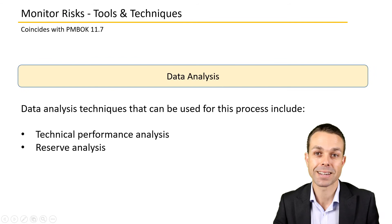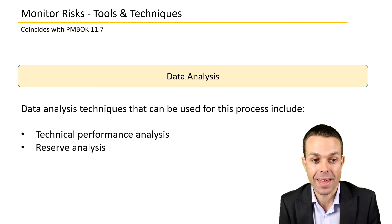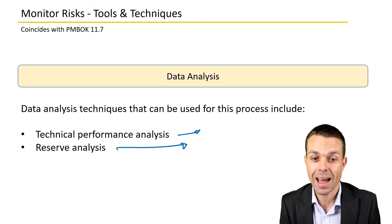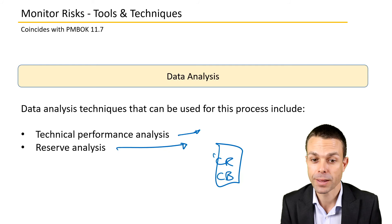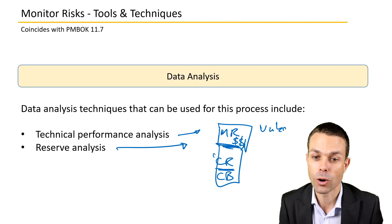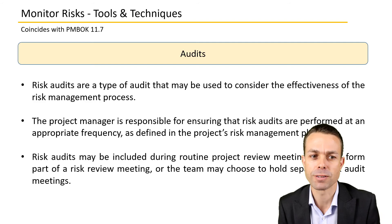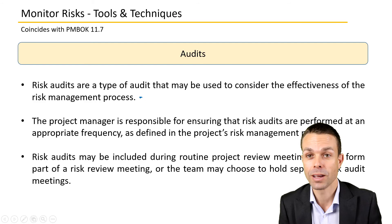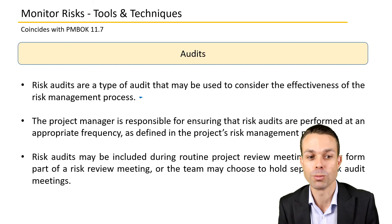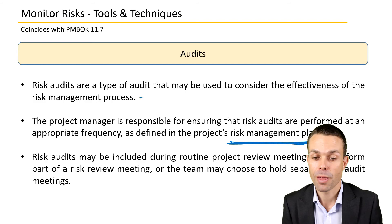Tools and techniques for monitoring risks include data analysis — specifically technical performance analysis and reserve analysis. Do we have enough contingency reserves within our cost baseline, and do we need any extra management reserves? Management reserves are the amount added on top of our cost baseline in the event of any unknown unknowns — risks that we haven't planned for. Audits may come about as well. Risk audits are a type of audit used to consider the effectiveness of the risk management process. The project manager is responsible for ensuring that risk audits are performed at an appropriate frequency, as defined in the risk management plan. Who needs to audit our processes and are they effective?